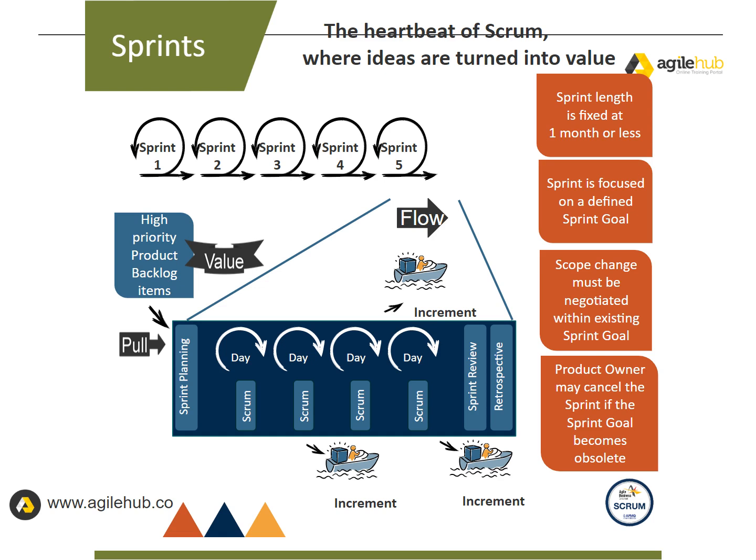The sprint. Sprints are the heartbeat of Scrum, where ideas are turned into value. They are fixed-length events of 1 month or less to create consistency. A new sprint starts immediately after the conclusion of the previous sprint.